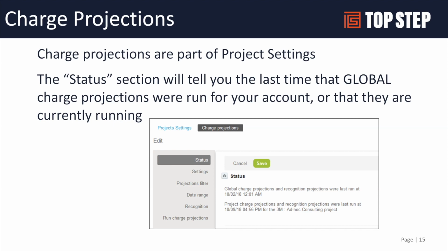And it'll store all the values based on how your billing rules are set versus how your basis of hours, or if you're using fixed fee rules, it'll also bring those in as long as those are set based on the future date, as well as revenue recognition methodology. Depending on if you're doing time-based as billed or percent complete, it'll calculate all that for you and store that